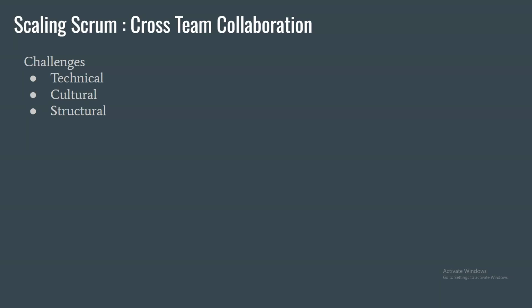Their backend will have one Scrum team, and then the QA will have one. What happens in those cases is the story will come, go to the backend developer, they will develop something, it will go to QA, then to front end. So what could have been completed working together in maybe 1 or 2 sprints ends up taking a lot more time because these teams are not talking to each other on a daily basis, right?